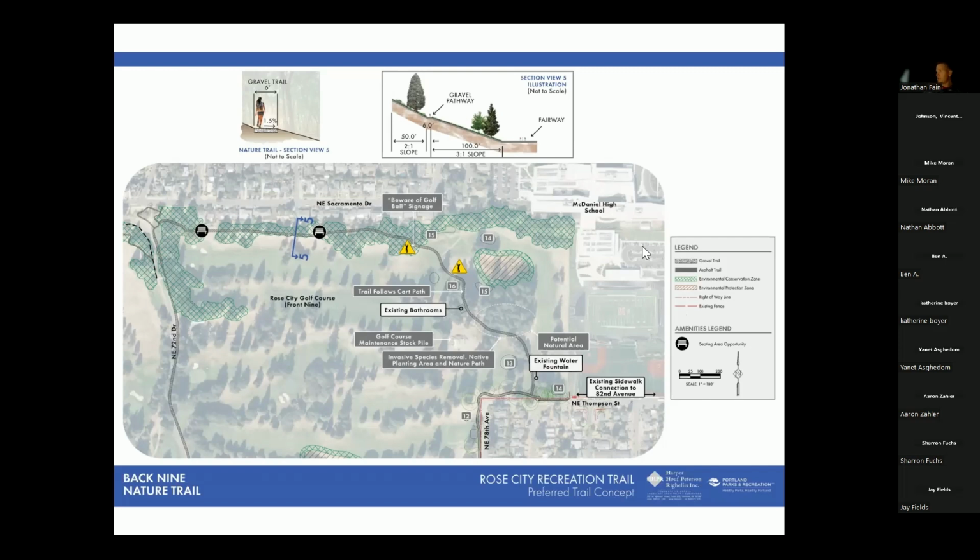Robert Price asks, is a land use review for trail width over 36 inches a type 2 process, or does it involve a public hearing? From what I have read, Robert, and been told by BDS, it is a type 2 process.